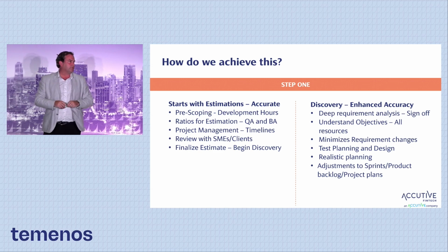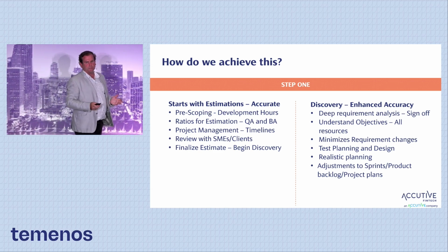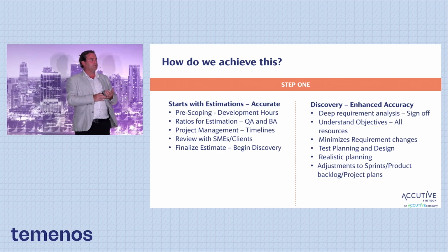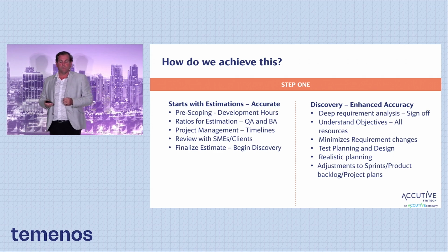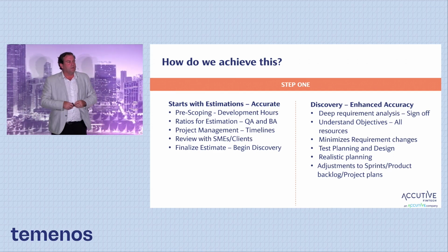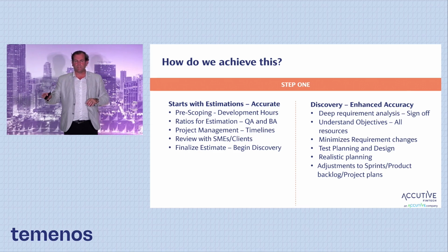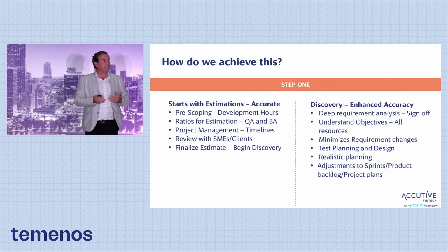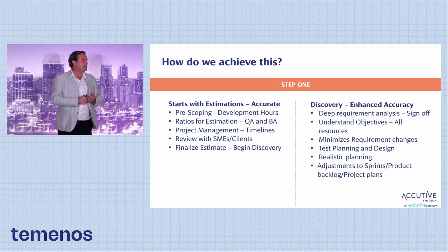We then go into discovery. The key part of discovery is the requirements analysis. Making sure your developers, your QAs, BAs, and most importantly, your product owners sign off and understand those requirements. Matching your business requirements with your technical requirements and everybody on that team understanding them. What this does is when you get into your sprints, it minimizes requirements changes.